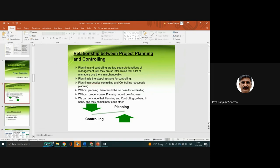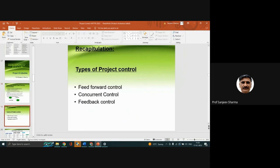In the first half, we talked of three types of control. Feed forward control is when, before you even initiate, you fix certain targets and goals and try to control those things - you decide what is to be done before the process starts. Then there is concurrent control, where both activities are undertaken simultaneously - you are operating and at the same time evaluating. And then there is feedback control, where after the event is over, you compare them.